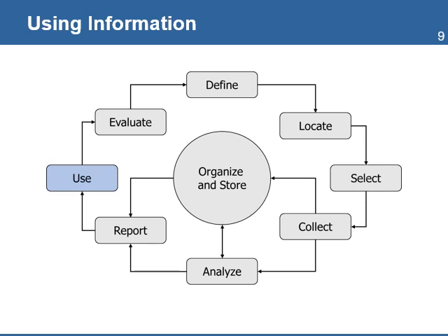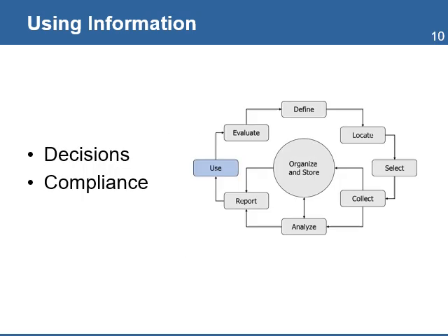These are decisions, compliance, knowledge, and support. Decisions are made on information that tracks progress to make changes in the strategies and approaches the project has chosen initially. This type of information includes project reports, evaluations, baseline information. Compliance is information used to meet legal or contractual requirements that the project has responsibilities for. This includes information to the donor and local governments.